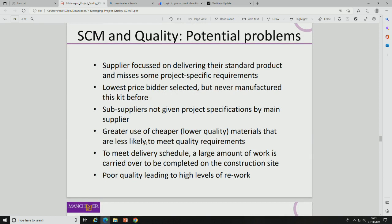Coming back to my example in National Grid, there's a company called PPC, I think. I can't remember now. PMC. They're a really high quality supplier for repairing high pressure pipelines, and they're expensive. And so National Grid sometimes gives lots of business to lower price companies from outside of the gas distribution sector, which are of lower quality. And they know that. They know they're going to have problems, lack of safety staff, lead time problems. They're going to have problems managing them in the main. But they're trying to drive the price down from their high quality suppliers.